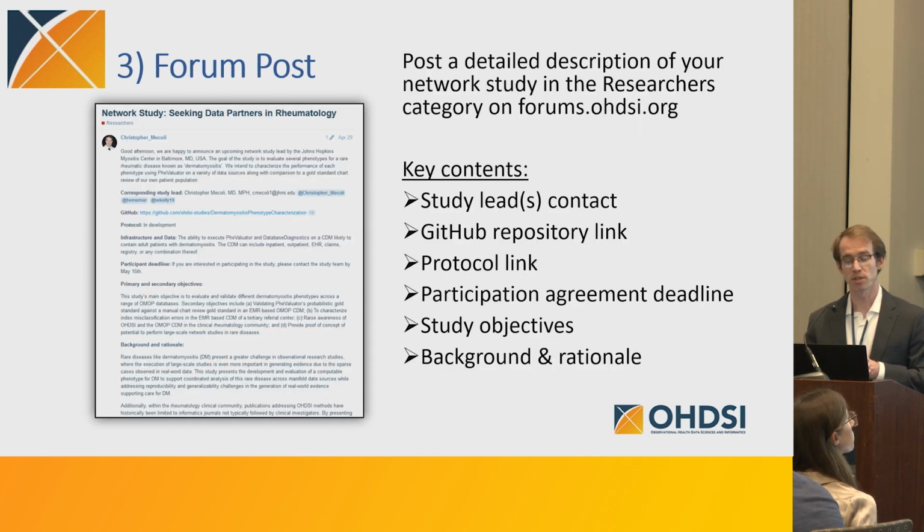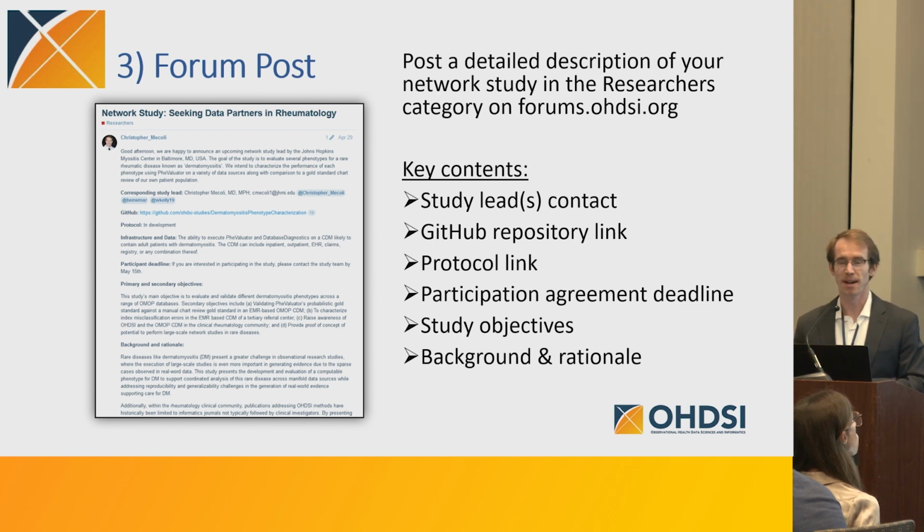And once you have your study protocol document and your GitHub, what feels like mostly ready to go, and you've tested it maybe at least once with your best friend, now you can make your forum post. This is what, funny, seemed not official enough to some people. They're like, how do we declare we are running a network study and we would like to call for the forum? It's again kind of OHDSI's philosophy. We're trying to do all of our communication in public so that people can see, and the replies, solving issues on GitHub, that's all done in public. So rather than emailing all your friends, you can do it that way too, but we're just telling you what the agreed upon way to announce your network study is, to start with this forum post that has some key information.